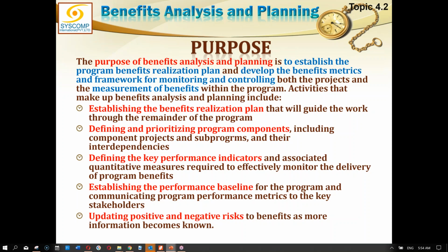Actually, why I'm explaining it, this should have been clear to you from your project management knowledge, because in project management also, we have a schedule management plan and a cost management plan, but still we have the schedule baseline, project schedule, and so many other artifacts coming out of it, Gantt chart and sequencing and all that.